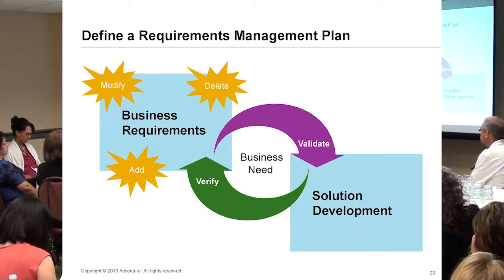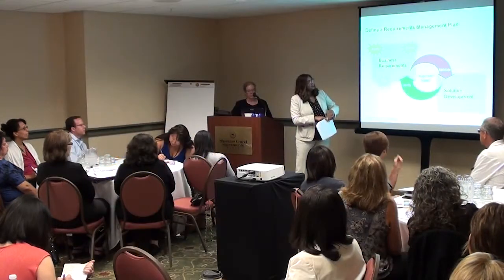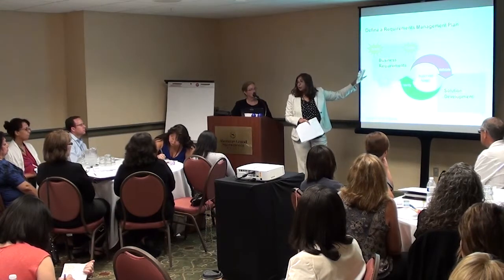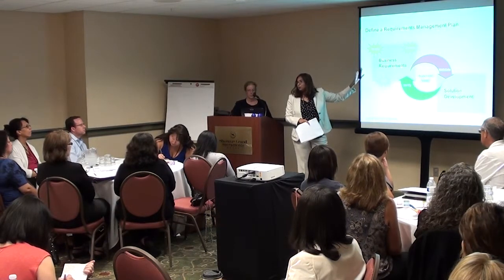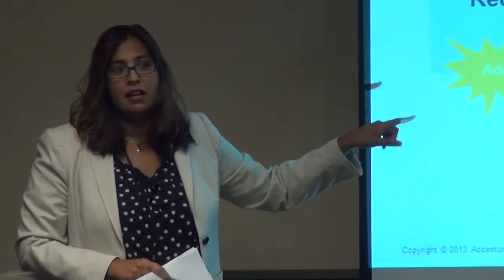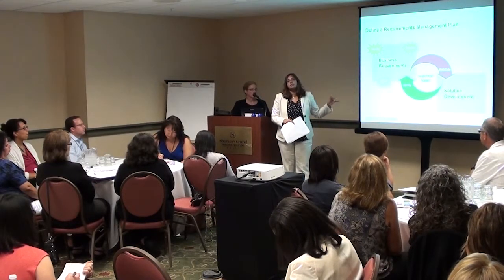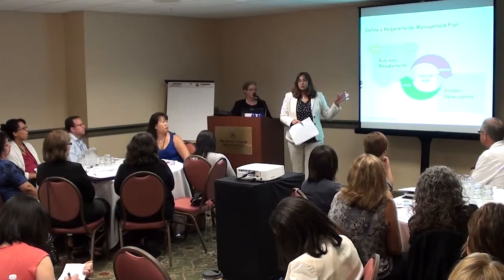It's important here that my picture is really trying to draw out that these are requests. Yes, they're going to change, and yes, we're going to add these or delete these, but they come in as requests, right? Change requests on a project. As you verify and validate that against the solution, what needs to remain at the center is the business need. Again, going back to ask the question, must we have this? Is this addressing a business need? Is this going to help us deliver that value that we said in the original business case needed to be achieved?